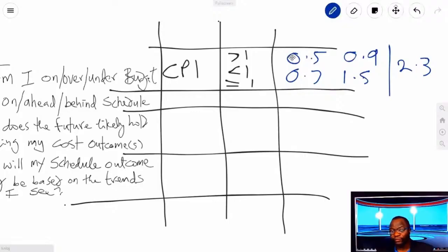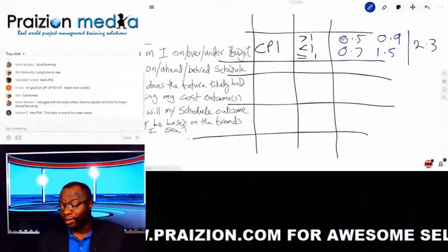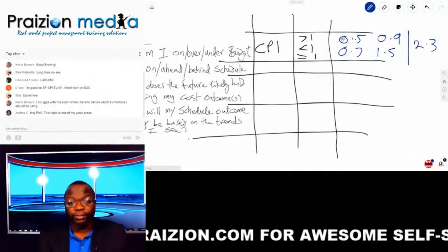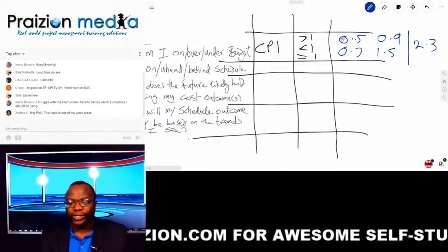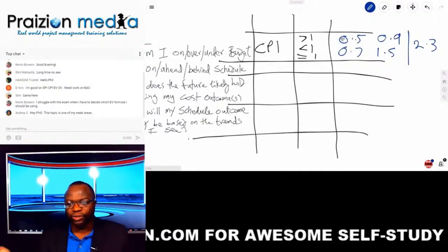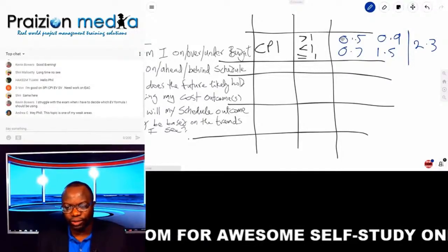Now, what does a 1.5 mean? It means I'm spending $1 and getting $1.50 worth of work out. That is not bad. But it could be bad if you're in government space and government frowns on you looking too good. Maybe you padded. So as you find these questions on the exam, you do need to proceed with caution, all right?